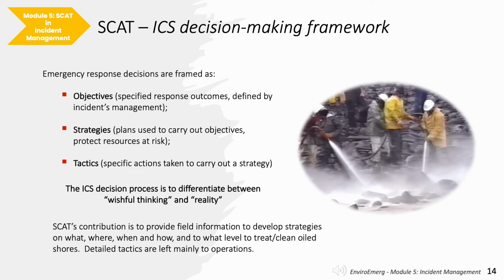Strategies are plans used to carry out the objectives. Strategies are developed as more information is known about the incident, such as during the initial response phase when SCAT is undertaking aerial reconnaissance to determine where the oil is spreading and what resources are being affected. Tactics are the specific actions taken to carry out a strategy, such as how to remove heavy stranded oil off sediment shores. Operations determines the details around those tactics.